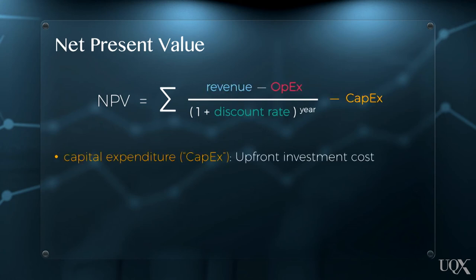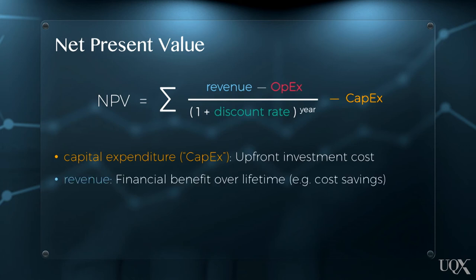Capital expenditure, or CAPEX, is the upfront cost to design and implement a project. In our LED example, this might include the cost of an energy audit, light bulbs, and the time taken to install them. Revenue is the financial benefit from the project over its lifetime. For LED lighting, this will be the dollars saved due to lower power use. For solar PV, revenue may also include the sale of any excess electricity to the grid.